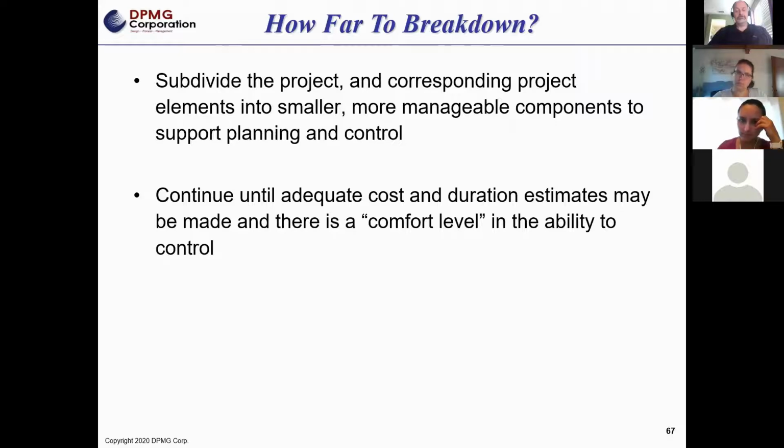So Julie and Jamie, in the things that you guys do, when you look at a very high level, trying to estimate how many hours of training you're going to do is difficult unless you have a breakdown of what the training is going to be, or what courses are going to be offered and how long those courses are. It's very difficult to say how many hours to come up with. And so that's why you need to break it down. Okay, what is the training that we're going to have? How long is that training? That's getting to a level where you can better define the cost.